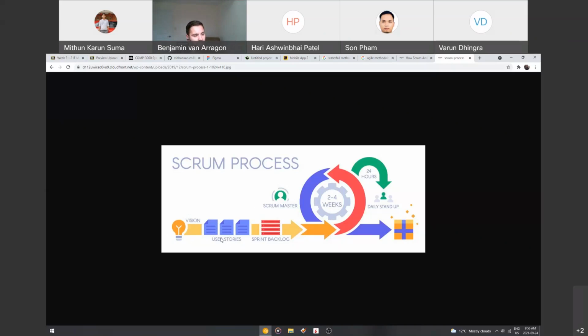Okay, so you're going to create a user story, and on each user story, if it's a little document or a little sheet of paper, you're going to have all of the things that you need for that particular task to work. So let's say it's the policy holders document for Cove Assurance for the policy page. You need a list of users from the database. You need profile pictures to load for the people who hold the policies. You need the policy numbers to work. You need a list view, right?